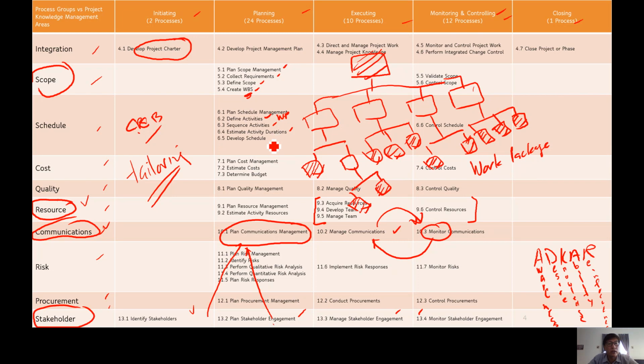Thereafter, estimating the duration, and we get what we know as the Gantt chart, the schedule, the mapping of time for every one of those activities or work packages. How long does it take? Start and finish. That's how we build our schedule. From where? From the work breakdown structure, work packages. It's like decomposing a big project into smaller constituent units. So we need to know this.